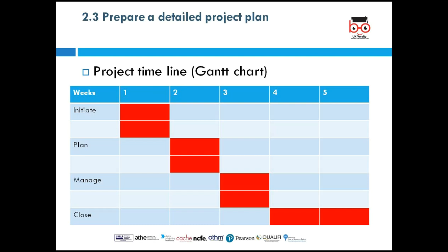Any material that is unused at the time of project closure, you declare all and hand everything over. If it's a house that you built, hand over the keys of the building. They'll come and inspect it. Everything is signed, paperwork signed. Then you hand over the project to the owner. That means the project is closed. We will look at procedures for project closure in our next lecture.